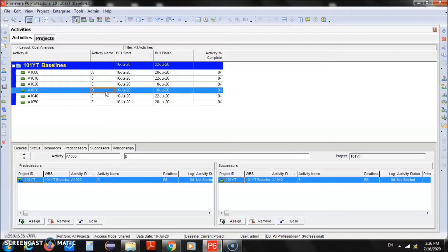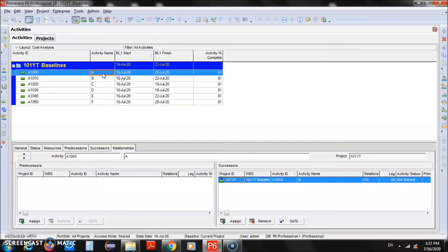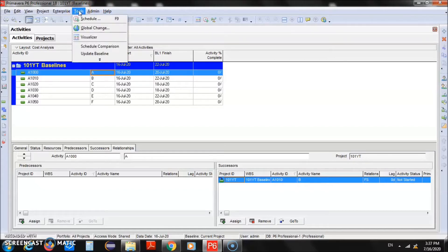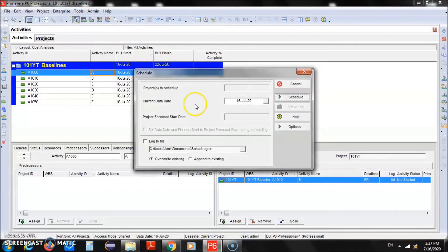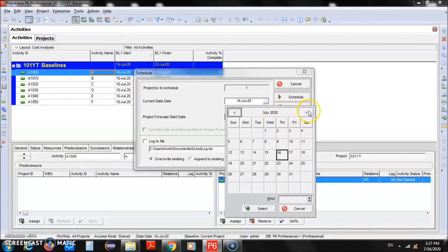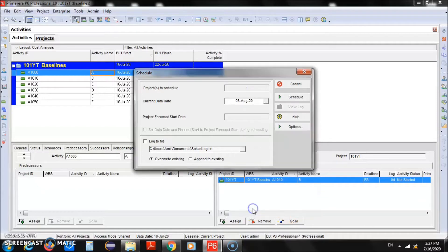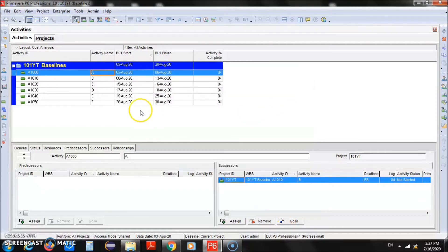If you are not clear how to define activities and relationship diagrams, you can watch one of my previous videos where you can see how to define network diagrams in detail. The purpose of this video is to work on baselines. We have our activities, durations, and relationships. Now we'll create the schedule — press F9 or go to Tools and click Schedule. You'll need to select the data date, which is the date when you start execution of the project.